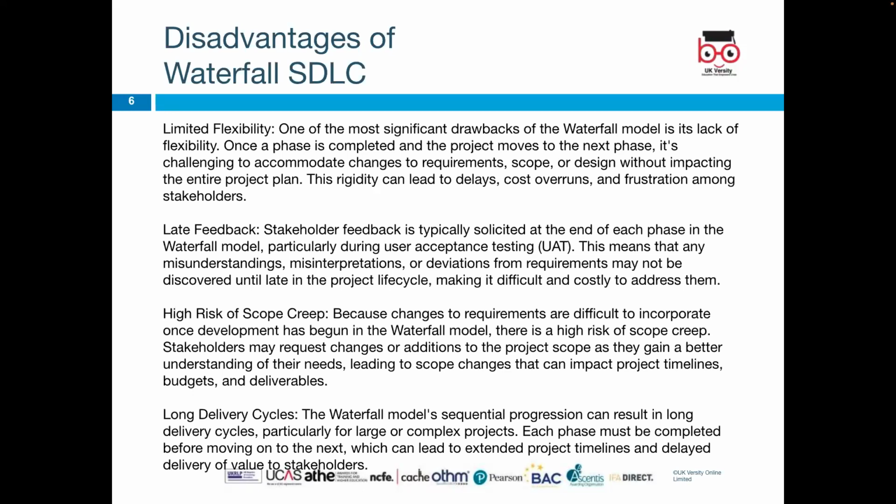High risk of scope creep. Because changes to requirements are difficult to incorporate once development has begun in the waterfall model, there's a high risk of scope creep. Stakeholders may request changes or additions to the project scope as they gain a better understanding of their needs, leading to scope changes that can impact project timelines, budgets, and deliverables.